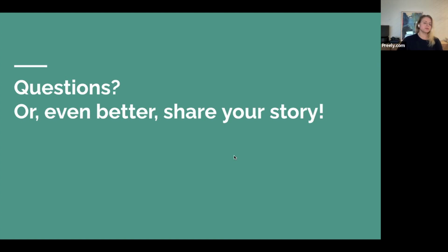Yeah. So you talked about having UX work in the same backlog, and there was some resistance. Do you have any ideas on how to actually make it work then? Yeah, so I did, but this particular development manager was very rigid on it, and I was like, it doesn't matter, right? I did explain to him, his concern, just to be candid, was he didn't want it influencing the velocity metrics because they were very concerned about their velocity metrics. One of the ways around it is you always assign 0 to the UX work, so then it doesn't impact your velocity at all, right? That wasn't comfortable enough for him. It still didn't feel right, but that's okay. He didn't want it, so we didn't have to do it.